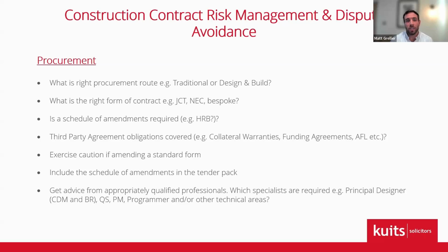Also ensure that you're getting advice from appropriately qualified professionals. Which specialists are required for this project? Has a principal designer, for the purposes of the Construction Design Management Regulations, the CDM Regulations, and for the purposes of building regulations, been appointed? And is the individual sufficiently competent to perform that role? Is a quantity surveyor needed, a project manager?